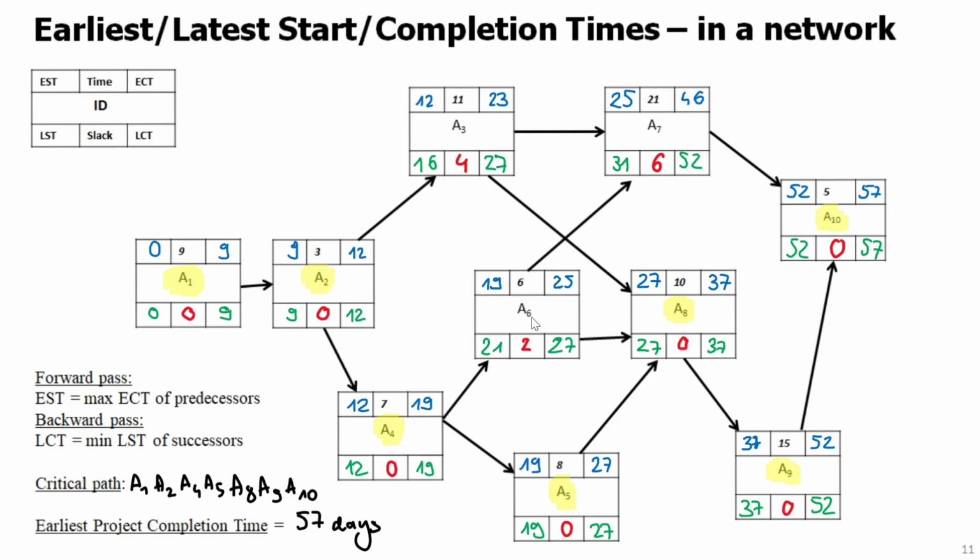However, it might be that one delay, for example, delaying this by 2 days and then delaying this also by 6 days might actually cause a delay in the project, because these slacks are kind of overlapping flexibility, right? You can only use the slack of one activity to the maximum with confidence that you will not delay the project. But if you use multiple slacks, you might actually remove some slack of the following activities in the project.